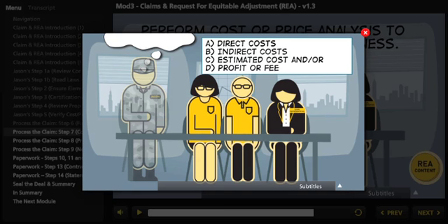Jason will work closely with the technical team to accomplish an analysis of the contractor's proposal, just as he did in the claim example. The team decides what costs are allowable, allocable, and reasonable, and there may be upward and downward adjustments as a result of a good analysis.